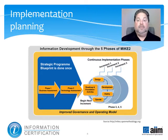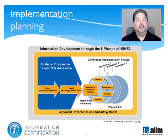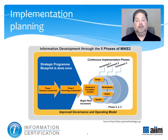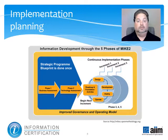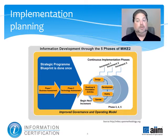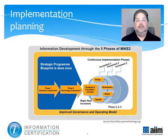In MIC-2, there are five basic phases to be planned and executed upon. Phase 1 is the business assessment, which forms the basis of the strategy for the entire implementation. Phase 2 is the technology assessment, which determines where your organization is in terms of its current technology, where you want to go with the technology that ultimately will be deployed, and where the gaps are between the two. Phase 3 involves the information management roadmap, which is built by gathering everything that's been assessed in the first two phases and leveraging it to build the working system. This forms the basis of which tasks, features, and functions take priority as the project moves forward.